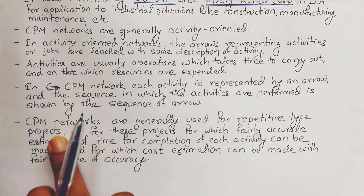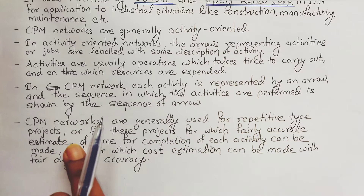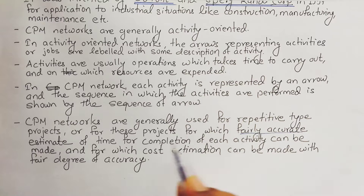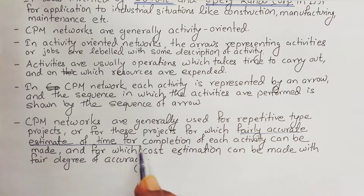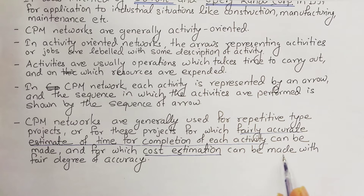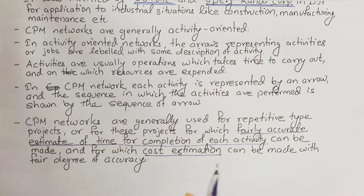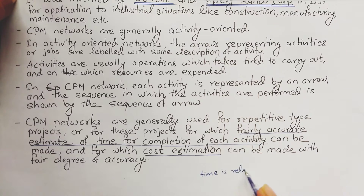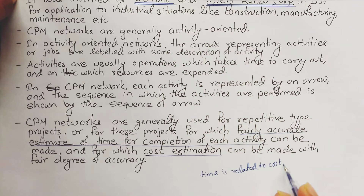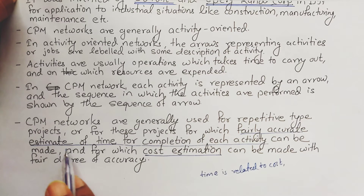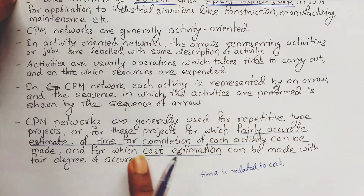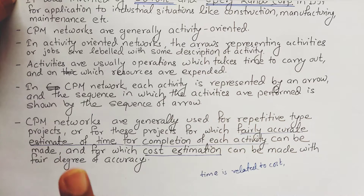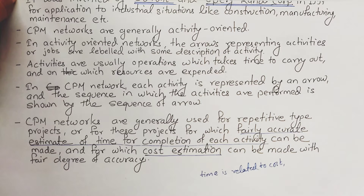CPM networks are generally used for repetitive type projects or for projects for which a fairly accurate estimate of time for completion of each activity can be made. In CPM network, time is related to cost. So CPM is used when a fairly accurate time estimate is required, and also when accurate cost estimation can be made for any activity.